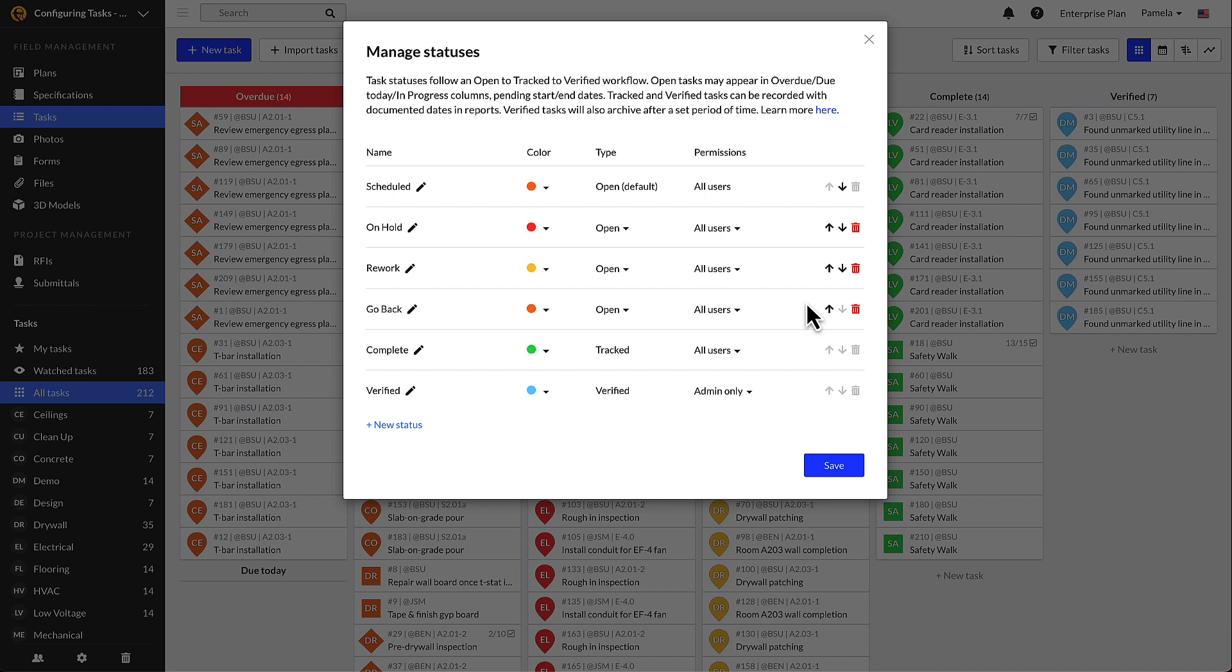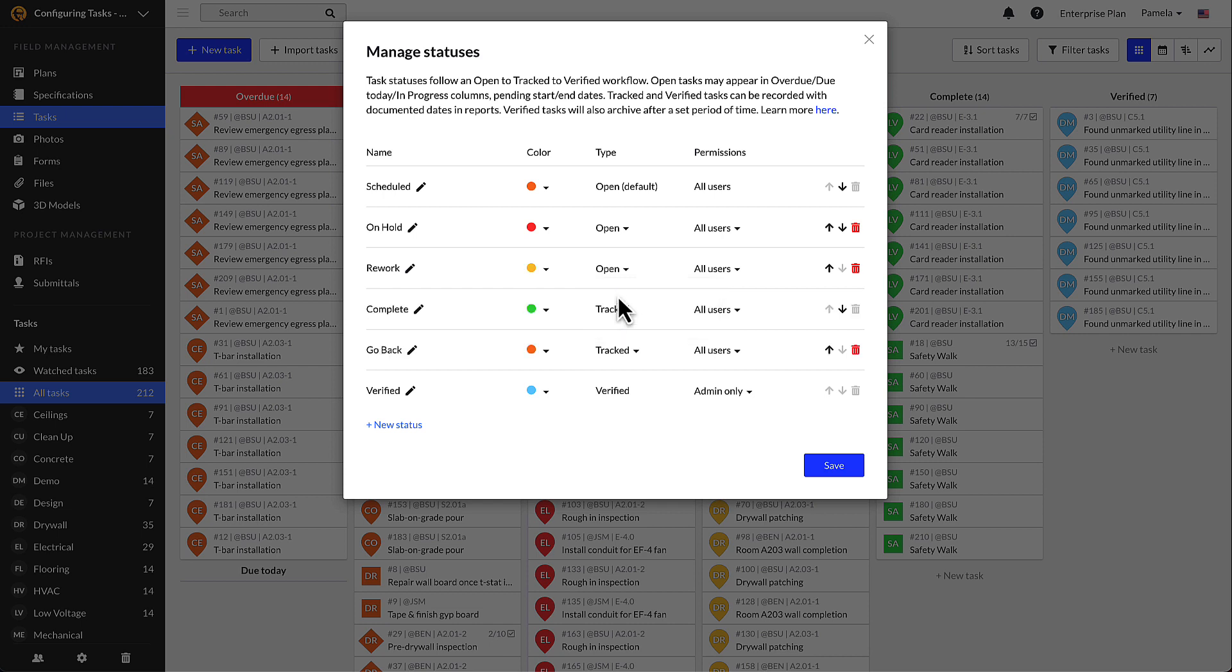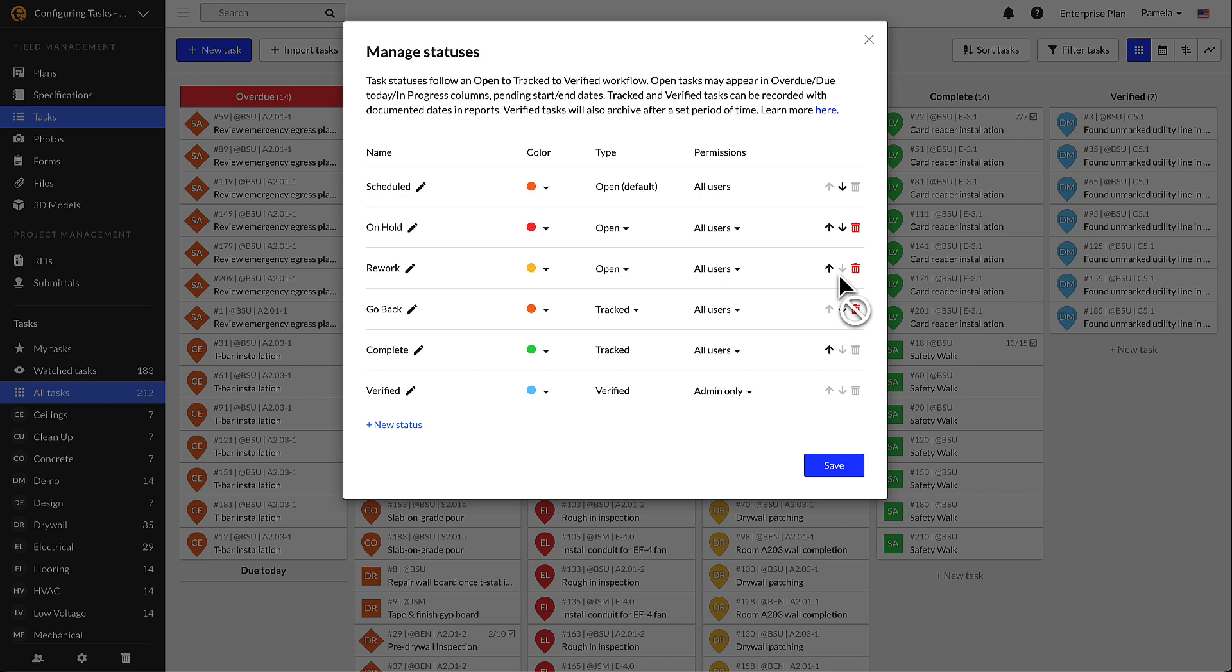One key thing to note is that custom task statuses will follow an open to tracked to verified workflow. In other words, a verified status cannot come before a tracked status, and a tracked status cannot come before an open status. Use the arrow options to adjust the order of the task statuses. You will need a minimum of three but can have a total maximum of seven.